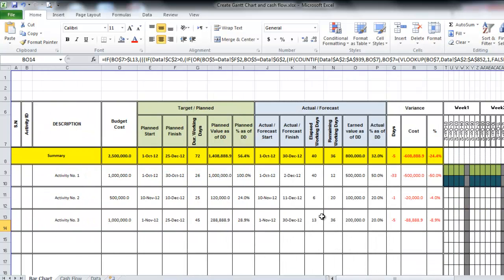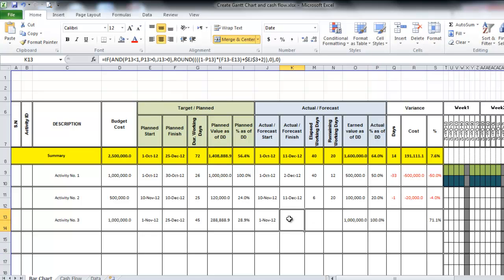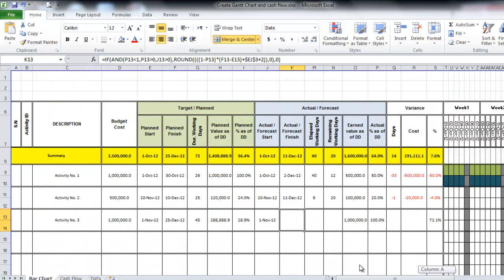If you need to mark this activity as 100% complete, you have to enter the actual finish date yourself. Remember, the actual finish date cannot be after the data date, so let's say it is 14 November.